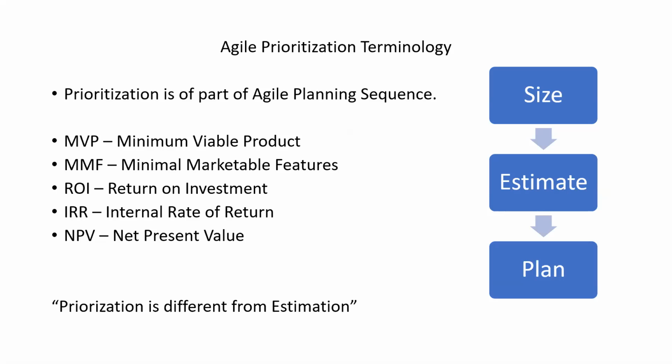In the case of a movie ticket selling website, the minimum viable product would be having the movies on the website and having the payment. Having the option of selecting and booking the movie in the theater for a particular time on a particular day, and then paying for the ticket. That's the minimum viable product. If that's there, I'll have revenue generated.